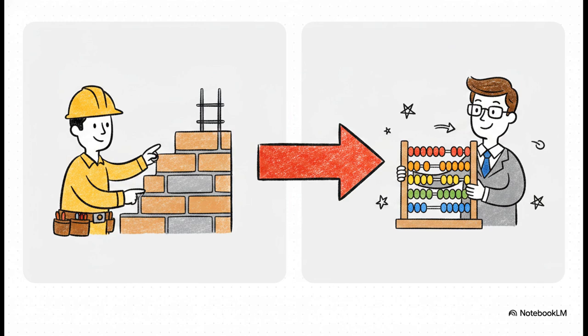And here we have what is arguably the ultimate partnership in construction finance. On one hand, you have percentage of completion. This is purely the project manager's physical assessment of the site. It is the crucial, absolutely irreplaceable input. On the other hand, you have recognized revenue, which is the accountant's financial calculation based entirely on that percentage. If the PM gets the percentage wrong, well, the accountant's revenue engine breaks down completely. The ledger relies 100% on the hard hat.